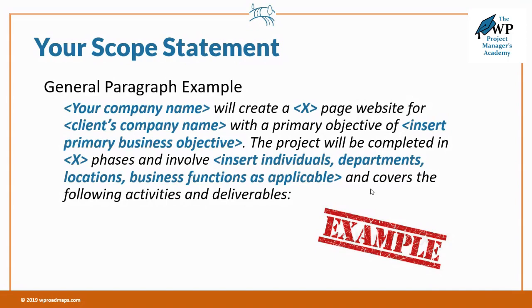Maybe the primary objective is lead generation, maybe it's a sales funnel, maybe it's an online store — whatever that primary business objective is. Then the project will be completed in whatever number of phases you're going to use, and it will involve whichever individuals, departments, or business functions need to be included. It helps to specifically name who at the client side will be involved. Then state that it covers the following activities and deliverables. Something very general, but clearly stating what the scope of the project is, with numbers of pages and phases where applicable.